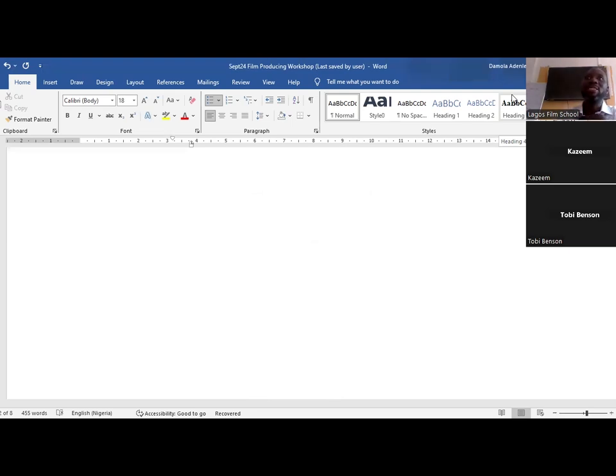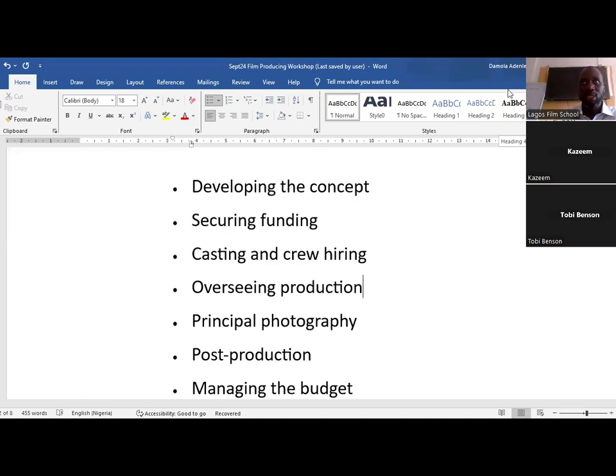In the estimate, we estimated 700K for accommodation. How much did we actually spend? You would input it in a second column next to the estimated value for each item. We'll do that for each item so that at the end of the day, you calculate both to know whether you spent above your budget, exactly how much you budgeted, or below your budget. Because we're supposed to also appraise the film at the end of the day. How well did we do on every level? Finances, creativity, the work done, the quality of the work, etc.